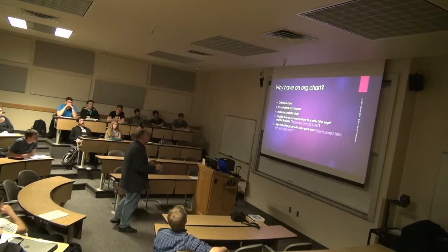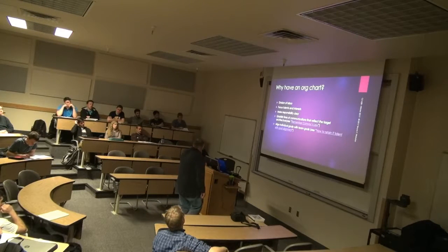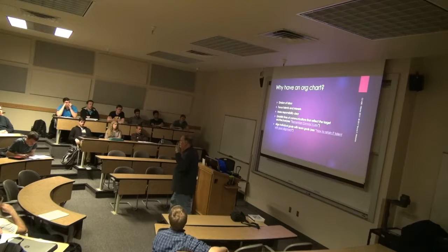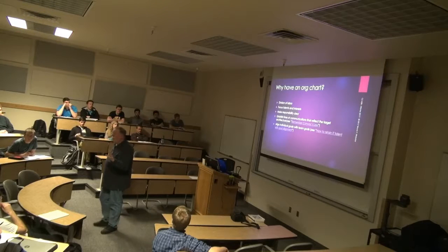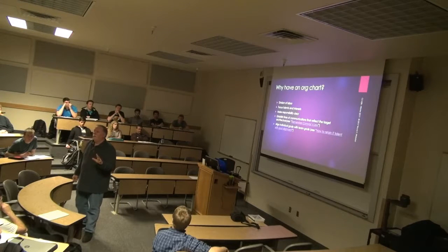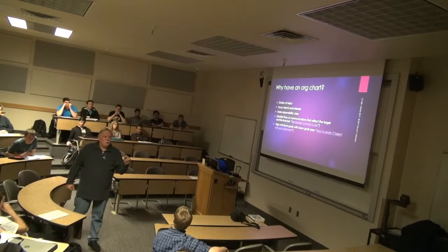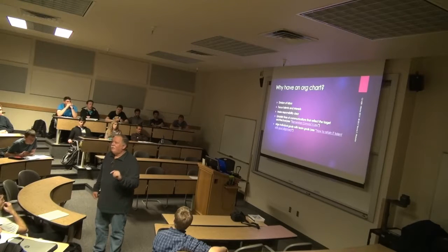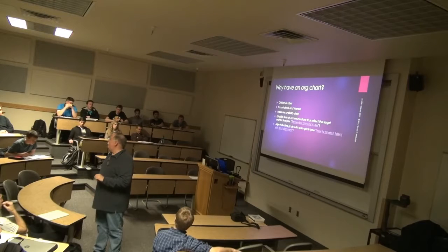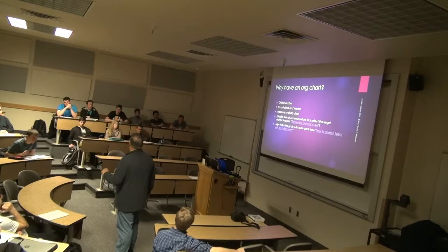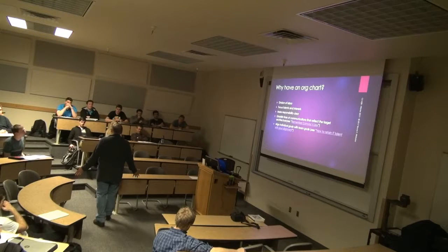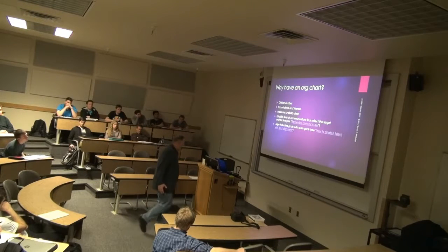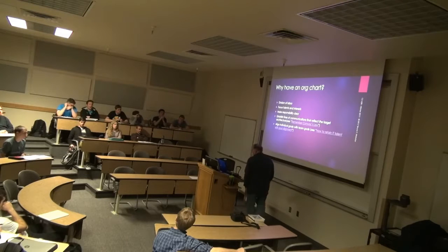You want lines of communication that reflect the target architecture. I don't know how many of you remember reading, assuming you read it, in The Mythical Man-Month, his reference to Conway's Law, which is that the architecture of the system under development reflects the communications organization of the group developing it. In other words, your app, your software program, your system actually reflects the architecture of the organization itself.